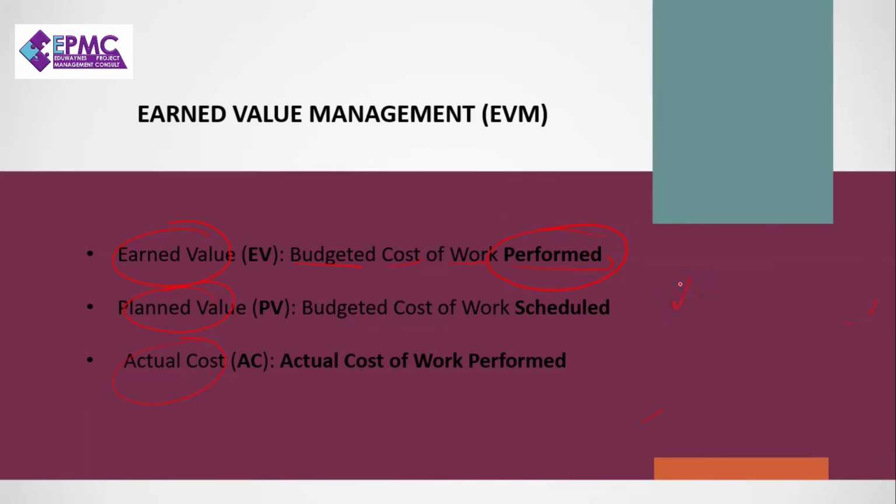So activity A, please understand this. B, C. So you send Osti to go and collect data. Osti, you gave them these activities. At that measurement date, earned value is actually done at some point. So if you have a proper cost management plan, it should tell you when you'll be performing your earned value analysis. Are you doing them quarterly? Are you doing them every month? Do you have a specific date that it should be done? It should be in your cost management plan.